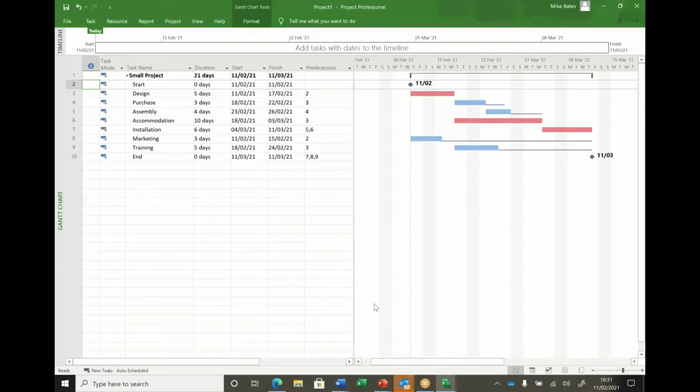I deliberately said 7 there because I knew that would take it over the top of the float it's got. As Joe correctly identified, just watch the schedule. The schedule is 21 days. It will go to 22. You will see bars changing color from red to blue and vice versa. So purchase is going to go to 7 and I'm hitting return now.